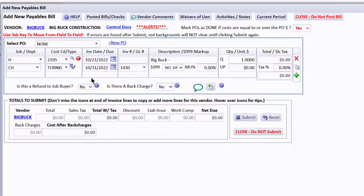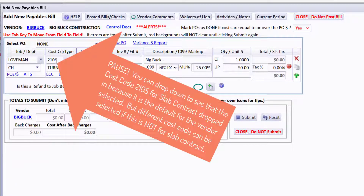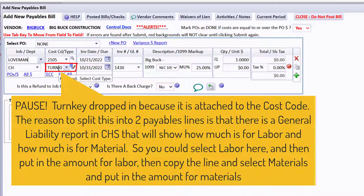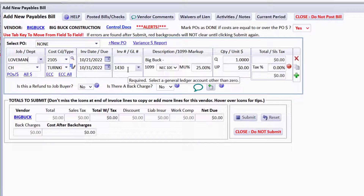Notice that nothing is filled in for the bill from scratch like it is from the PO. I can just start selecting a job. If I select Loveman, the GL number drops in, cost code 2105 drops in because that's what I set up as the default for the vendor, and a turnkey cost type drops in. If you know the difference between materials and labor, it would be good to do one line for labor and copy it for materials with the two different amounts.